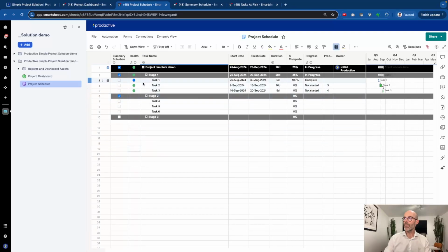Now, up here is taking a calculation and looking at these numbers to decide, well, what does that mean for this row and then the ones below it. So what I'm also just going to do is add in this one to say that the predecessor is 5, and this one is then 7 and 8, and let's just put in these to be 5 days, 5 days and 10 days, for example. I've got an overall plan here.